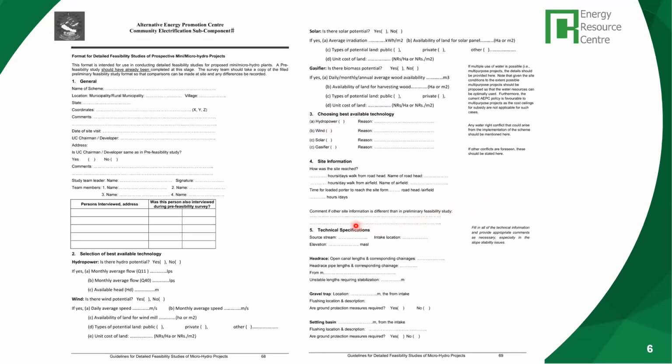Then you provide the site information. Like in the case of Nepal, some of these sites are away from roadheads, because we are a mountainous country. In Mozambique, although you also have hilly areas, maybe the accessibility of the site may be different. And depending on the location, the accessibility from the nearest town or nearest center, the subsidy rates vary in the case of Nepal.